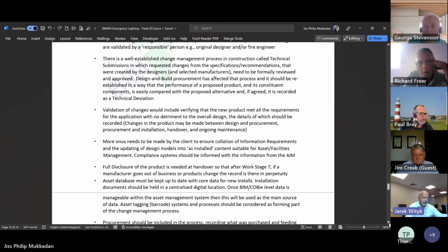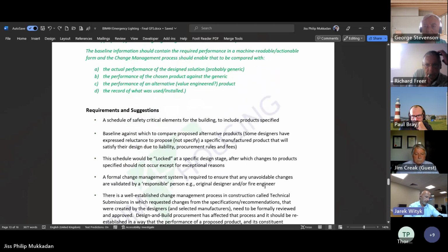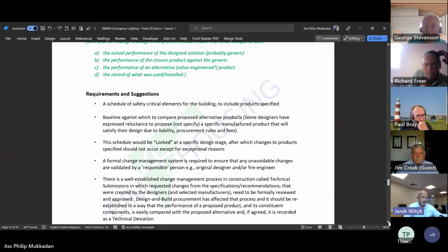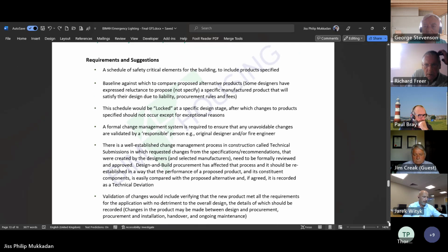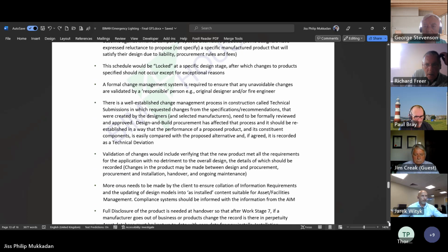As guidance, you almost need a kind of process map of cause and effect. What's happening and what can happen if you don't do this and that. Because the change in regards to emergency lighting will be driven from experience, say aesthetic points of view, and then cost. They're combined, and then you've got technical checks being made on whether what's proposed from an aesthetic point of view actually complies with requirements and gives you enough light and duration. And if this fails, then you go back and it goes round the circle. I don't know if that makes sense.